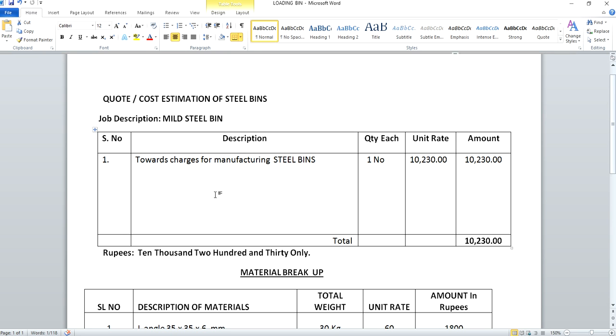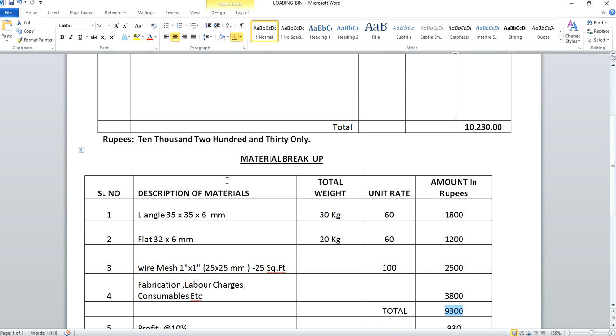So you need to know material procurement, and then the machineries and the labor charges to be analyzed for fabricating. Like how much man hours is required, like welders, fitters, riggers, likewise, and what are the machineries and accessories required. For all these things you'll have to consider. So now let's start one by one.